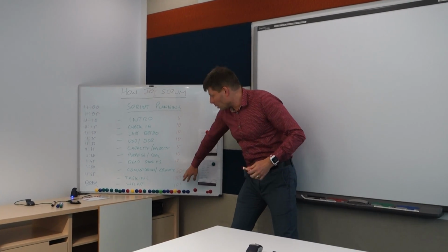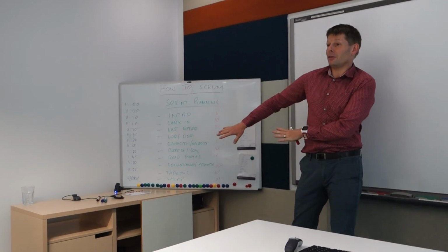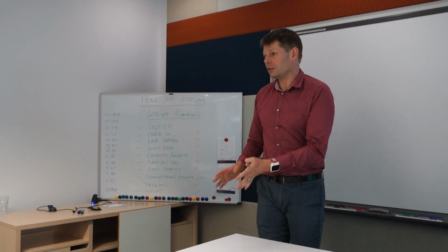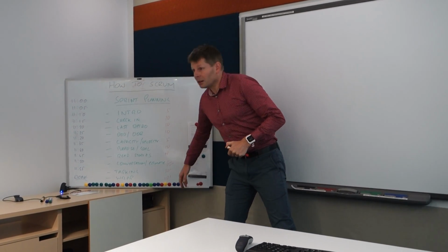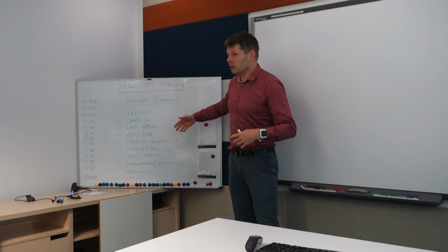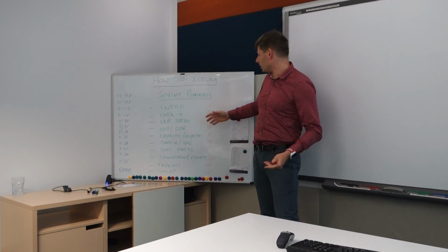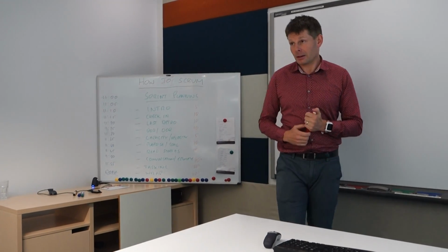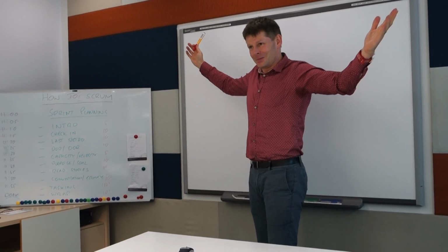So I reckon a couple of hours for tasking, and that's usually totally up to the team, and the Scrum Master's only there if they need them, as is the product owner, just to clarify any questions. Then we'll wrap up at the end, just to make sure we've gone through the sprint goal. We talked about the retrospective again, what the overarching sprint purpose is, and the stories that we're pulling in. And then that's it, you're off. 2 week sprint, good luck, I'll see you at the review.